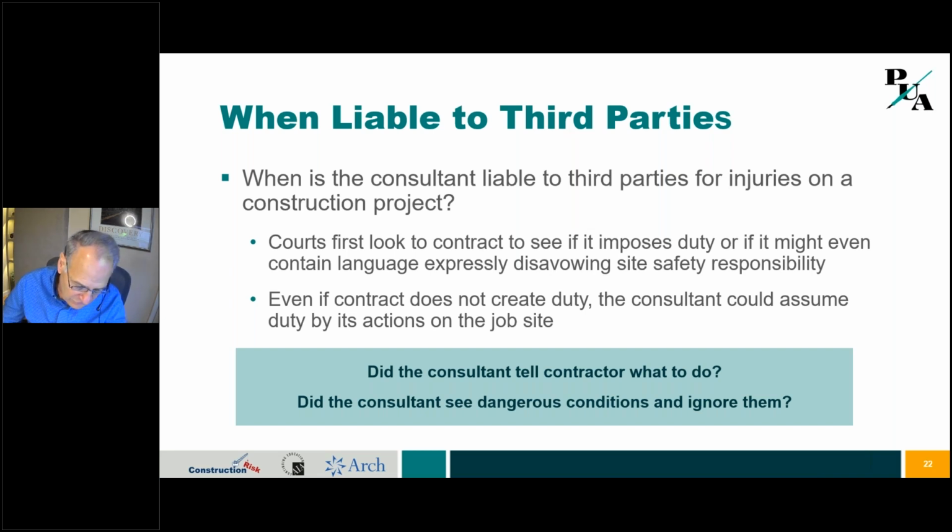going forward. So I would say you issue a written communication saying, we did this today. We did it to save a life or to stop an imminent danger. We're not doing this in the future. This is a contractor's responsibility. That way a court can't try to impose that liability. Okay, next.